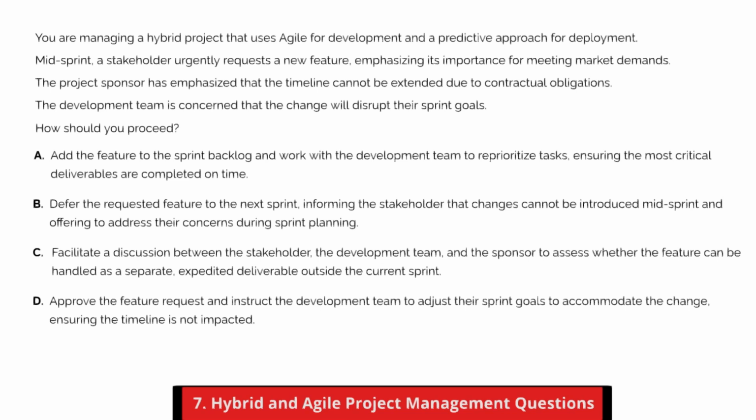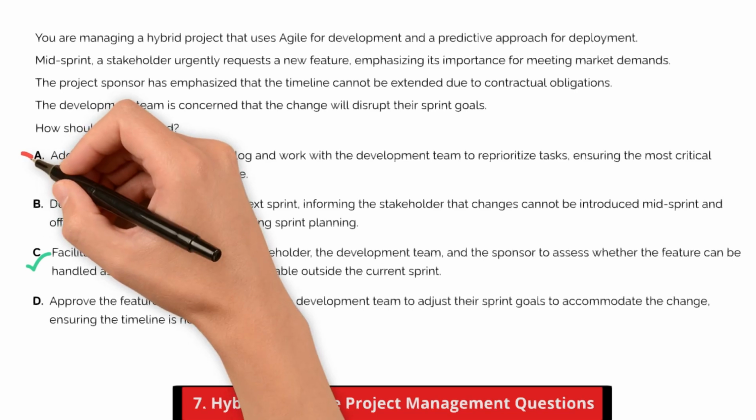All right, let's walk through this. The best answer is C. Facilitating a discussion between the stakeholder, development team, and sponsor is the best approach. This collaborative effort allows for exploring whether the feature can be handled separately from the current sprint, minimizing disruption while addressing stakeholder urgency. It balances the Agile principle of respecting the sprint backlog with the need for flexibility in hybrid projects. Let's look at other choices and why they are not the best answer.